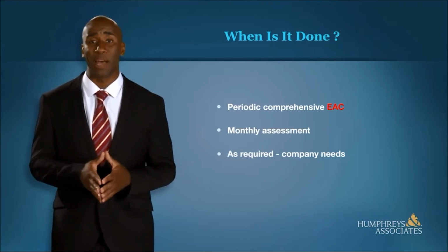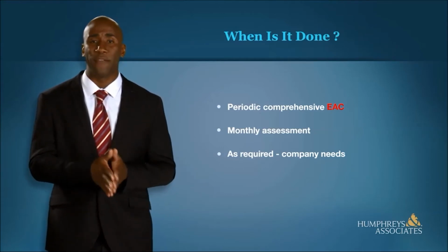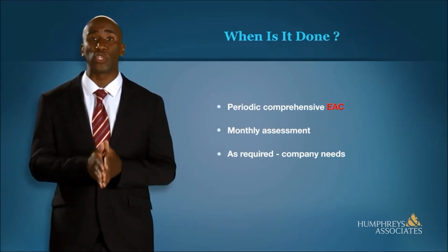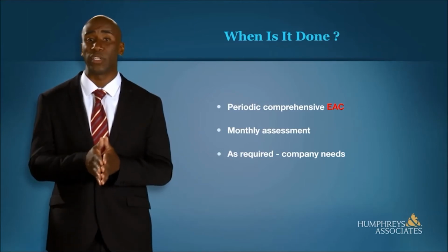How is this monthly assessment accomplished? In an earlier part about variance analysis, situations where the control account manager might revise the EAC were discussed. These revisions are usually based on the variance cause, impacts on the project, and the corrective actions taken or proposed. The revisions may be for labor, material, subcontracts, and other elements where the CAM does not believe that the variance is recoverable. The CAM provides rationale to the project manager for the requested EAC change. This is usually accomplished as part of the VAR process.